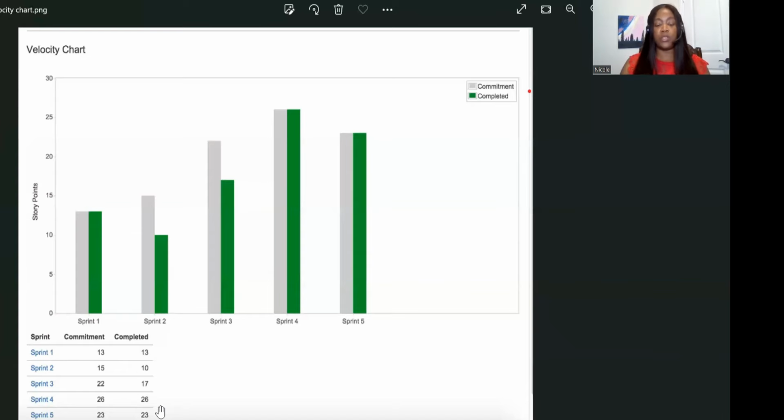So when you're in your sprint planning meeting, it's really good to know the velocity before you even go to the meeting, because as your team members are accepting the work, as your product owner is pulling the stories into the sprint, those story points are adding up. Once the story points get to the velocity that you just calculated, this is the time for you, the Scrum Master, to encourage the team, educate them, coach them, and let them know that we have reached our velocity for the sprint. This is the right place for us to stop.